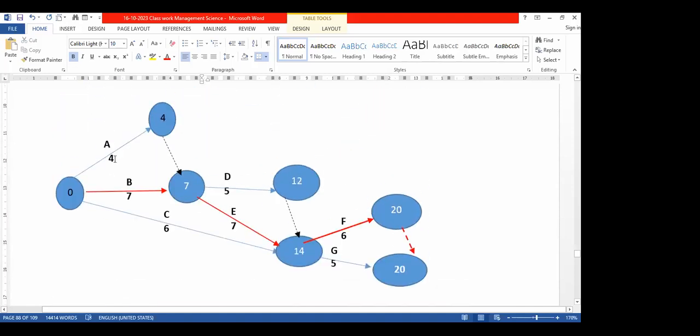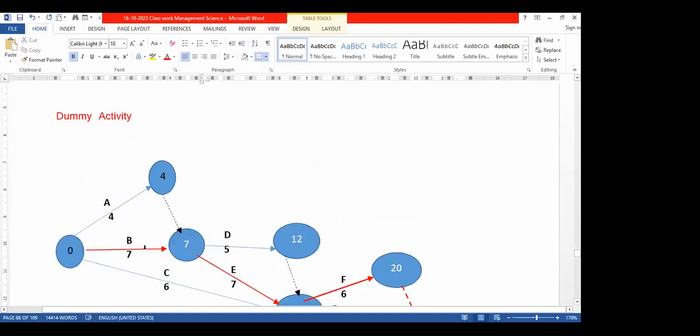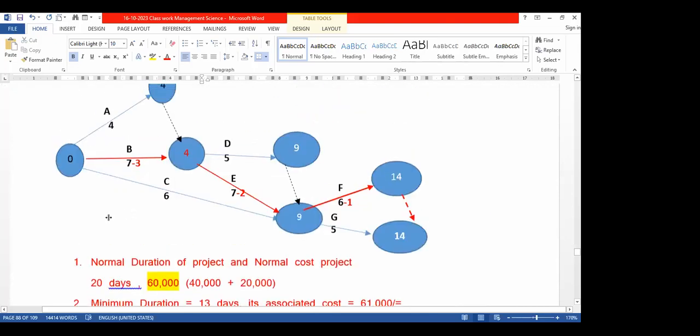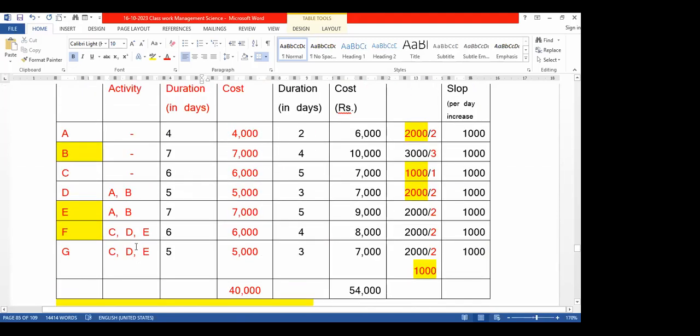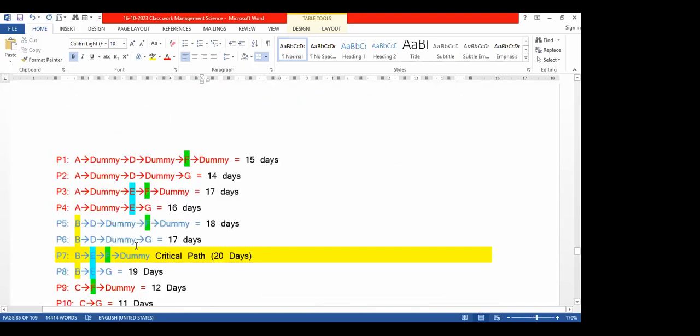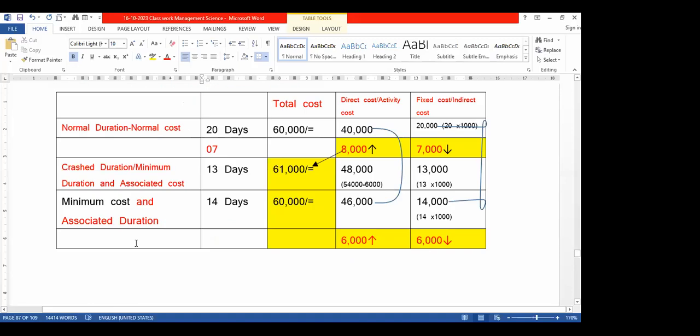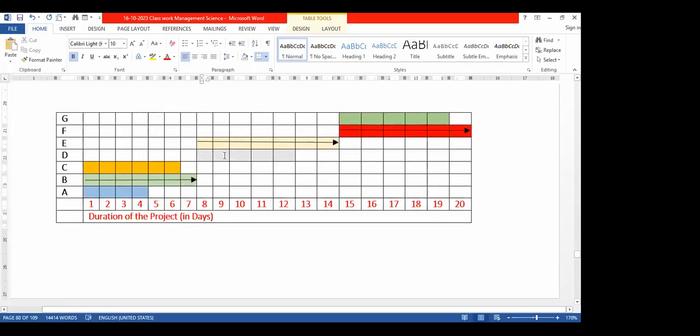You see the original table. A and B are preceding activities for E, right? So while we are starting, we have to carefully look into where we start. So D is starting from here. Similarly, E is also starting from here, because for both, A and B are preceding activities. B is ending here. So that is 1, 2, 3, 4, 5, 6, 7 days for E.